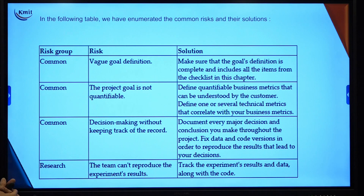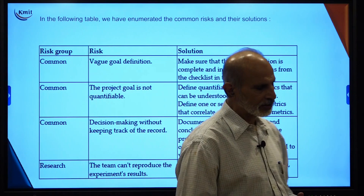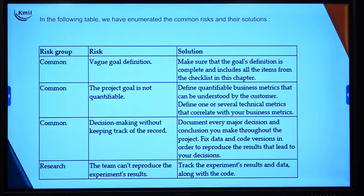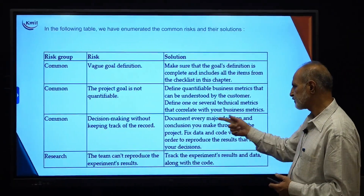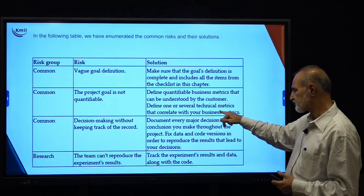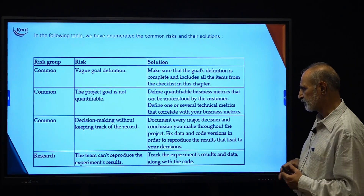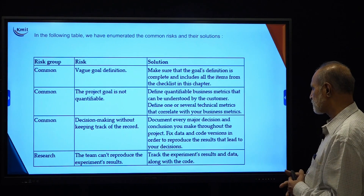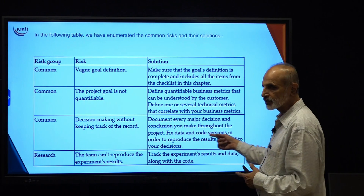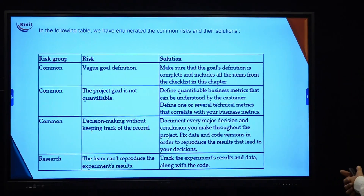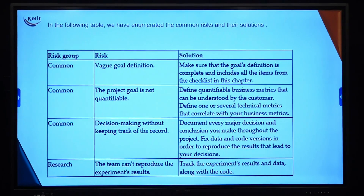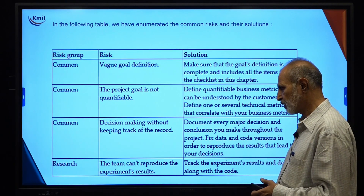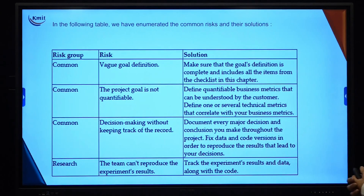Business metrics are different, and our data science metrics must correlate with them. Third, decision making without keeping a track of the record — document every major decision and conclusion throughout the project, and fix data and code versions in order to reproduce the results that led to your decision. Your fixed data and code revisions must be documented well, so that you have fewer problems and less risk. These three are under the common risk area.